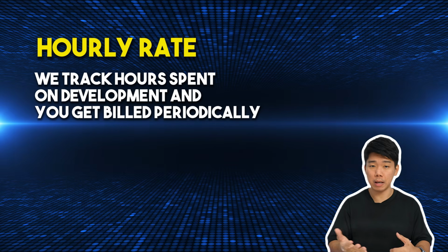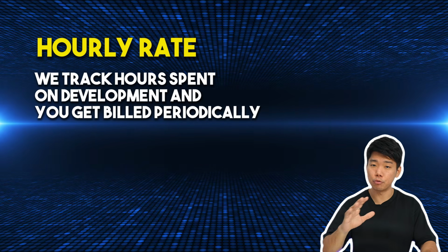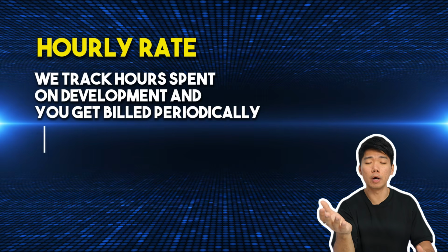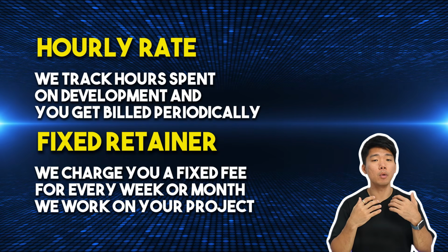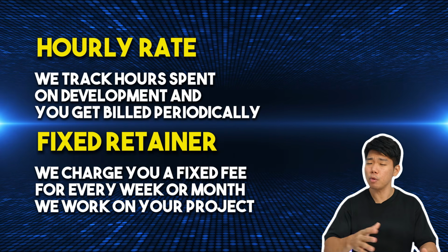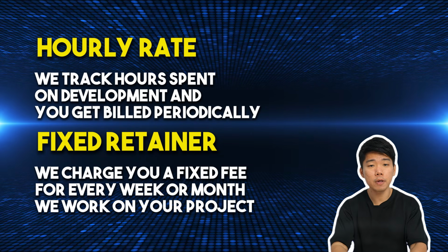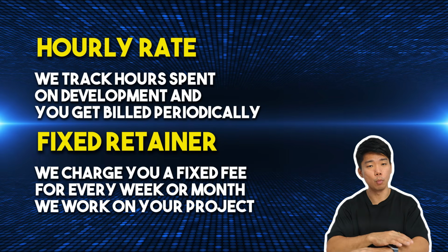The most common way you will see this in practice is through an hourly rate. We track hours spent on development and you get billed periodically, usually at the end of a development cycle, or we may opt for a fixed retainer. Instead of going by hours, which can vary wildly and takes time to track and tally, we charge you a fixed fee for every week or month we work on your project.